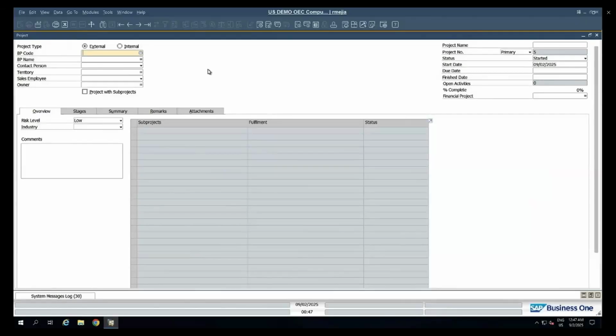Each of those stages that are part of a project needs to be defined with a progress percentage, and that progress percentage will eventually add up to 100%. We can see that percentage moving forward right here in the percentage complete area of the screen. Now, each stage may contain data that is relevant for the project, so that data allows us to analyze project value, cost, and profit.